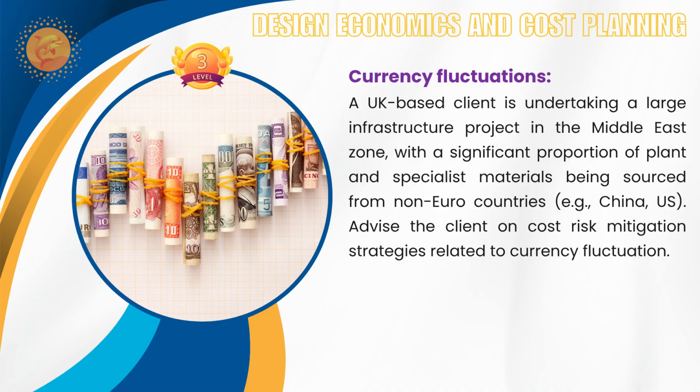Mitigate means hedging, advice on forward buying currency. You can buy the currency itself. If you are going to buy products from one specific source and this is going to be spent in US dollars only, you can buy the currencies upfront and keep your money in that currency. That is one kind of strategy.